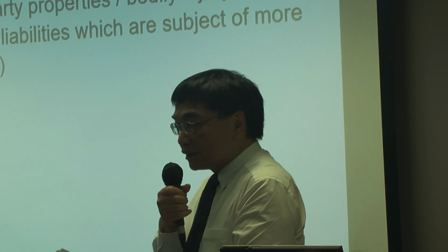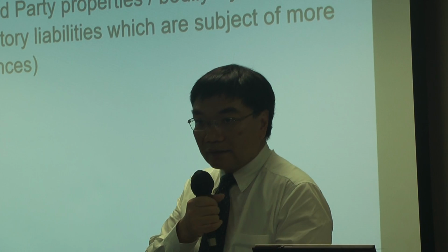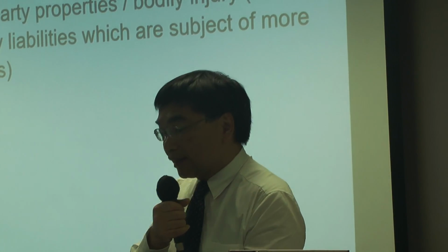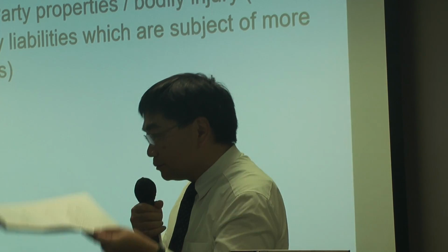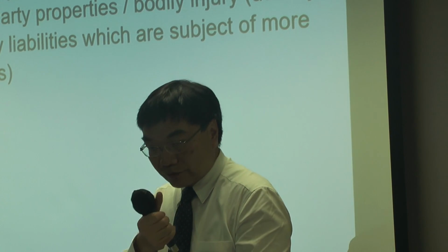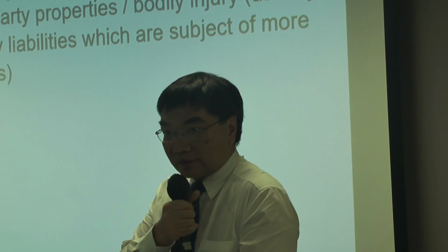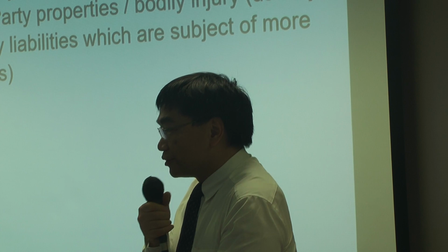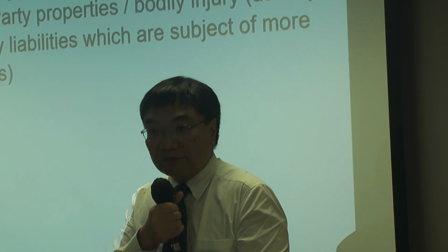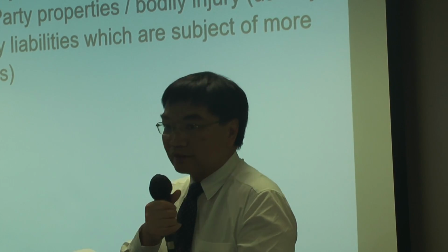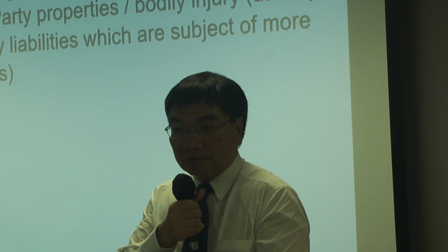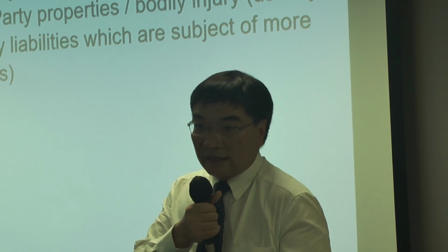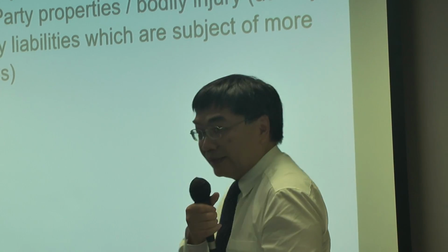So if the occupier under the podium is going to submit a claim to the contractor above the podium, they have to prove the loss first of all, and prove the causation. Sometimes it's very difficult to prove the causation, and it is necessary to have some report from a governmental organization to give a hint on what had happened. So again, the onus of proof.